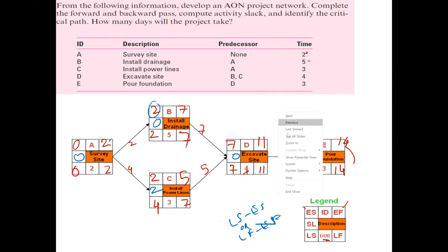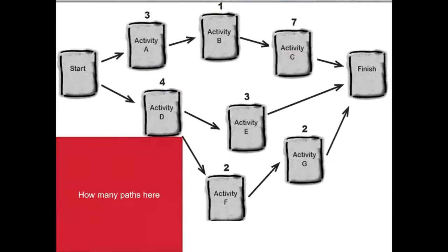So we could see that the path which comprises all the critical activities would be a critical path. So in this case, these activities must be delivered on time. Whereas we have got a float of 2 weeks, which basically means we can delay this activity by up to 2 weeks without any impact on the project deadline.